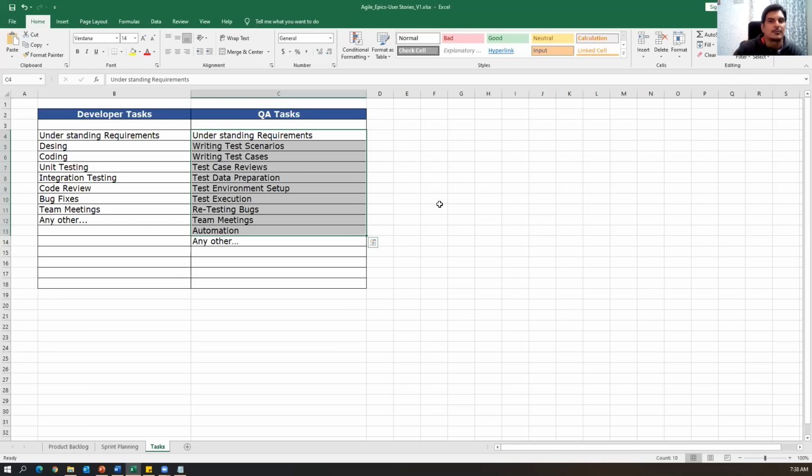And we have to give the demo to the product owner, and the product owner may accept or reject. If he accepts the demo, fine, this is ready for releasing to the customer. If every story in the piece of software is working fine and the demo is accepted by the product owner, then that piece of software is ready for releasing. So this is the whole Agile and Scrum process.